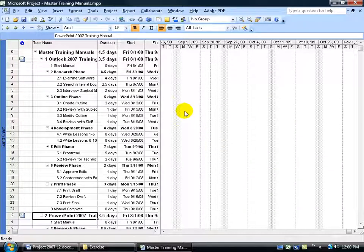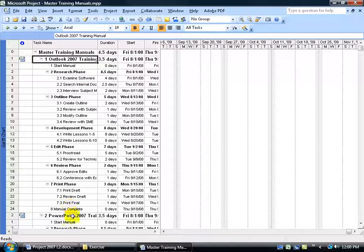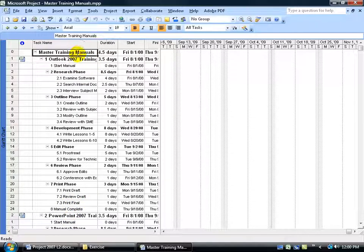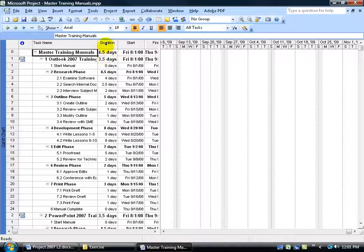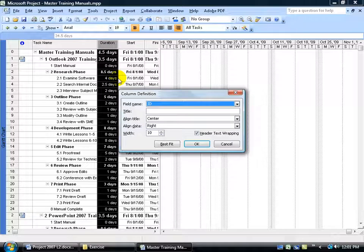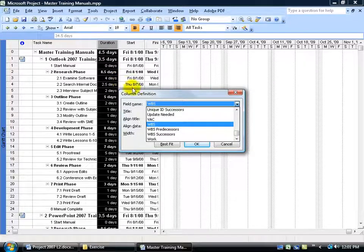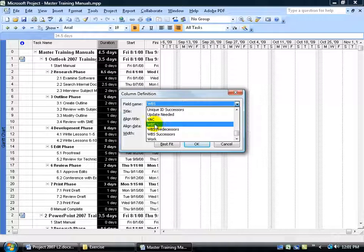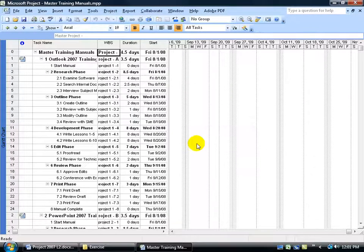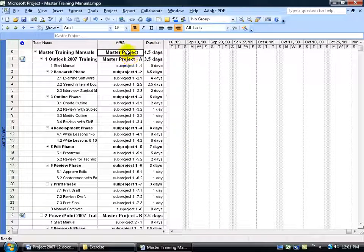Now we have everything set up. I've got my work breakdown structure code customized in my individual project files. Then I've customized one for the master file here. Now when I want to display them all, you have to come up here and insert it as an individual field or column here by right-clicking on the column header of any column that you see there. Go down to Insert. Type the W to get us to the Ws. There's WBS. Go ahead and select it. Click OK. And there we go. Let me double-click between the two column headers to do a best fit for the WBS column field.